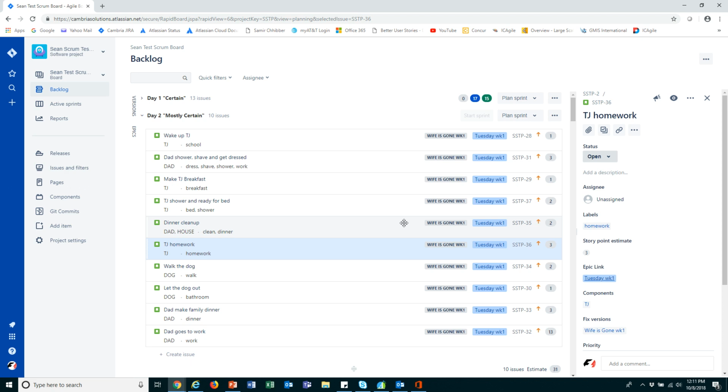But in the early stages of a team, like I said, they're going to hit and miss a lot. So I want to make sure that I leave some room for that. All right, so as I'm planning out my sprint, I'm going to leave it a little light. I can always pull in more stories as necessary.